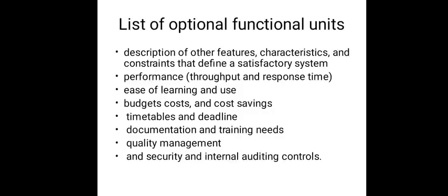Therefore, you have to create two lists and maintain them through the design study. Any assumptions you make during requirements and design process, including the rationale or thought process behind those assumptions. Assumptions may be used to identify related sub-projects of items of work, which are outside the scope of or after this project, and major issues.